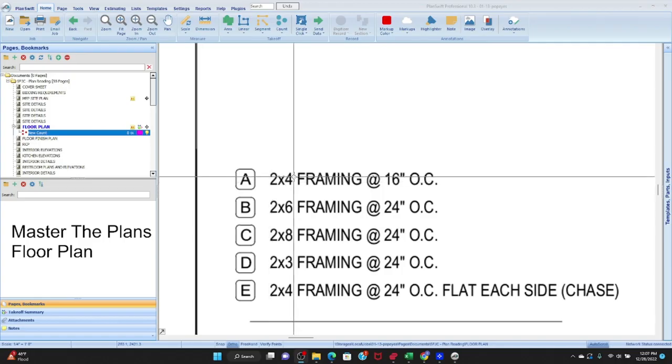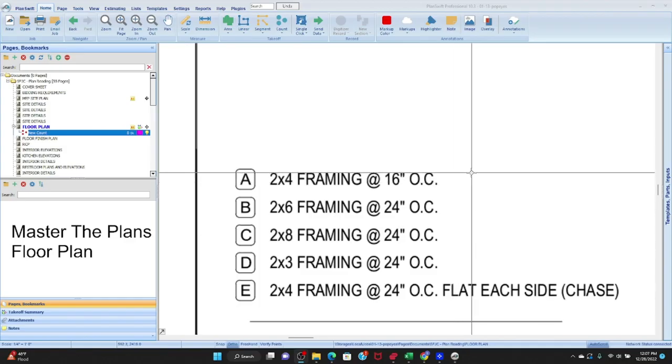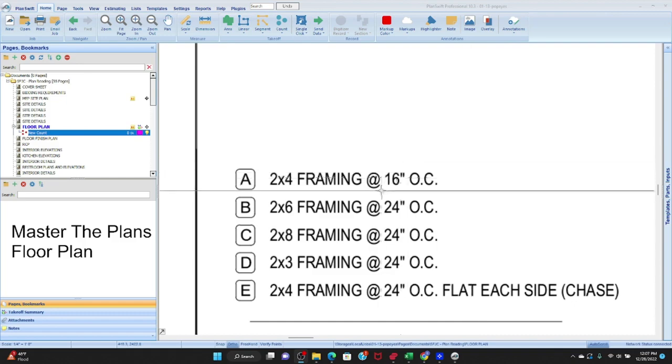So we know if we have 100 feet of 2x4 framing, we can multiply that 100 by 12, right? That will now be 1,200 inches. And then we divide by the placement, divide by 16. And that tells us how many studs. So again, this doesn't only apply for studs. This applies for nails, anything where you see the plan saying that you have to place it at whatever inches off center. Always keep that equation top of mind.